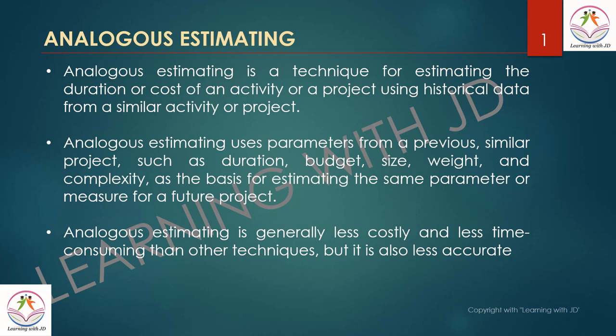Analogous estimating is a technique for estimating the duration or cost of an activity or a project using historical data from a similar activity or project. If such an activity happened previously and took say seven days, you would estimate plus or minus around that figure. Analogous estimating uses parameters from the previous similar project — such as duration, budget, size, complexity, and weight — as the basis for estimating the same parameter for a future project.